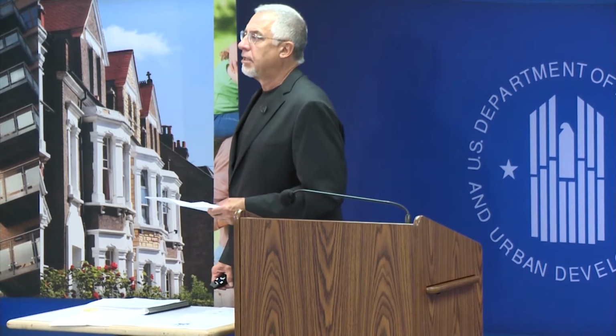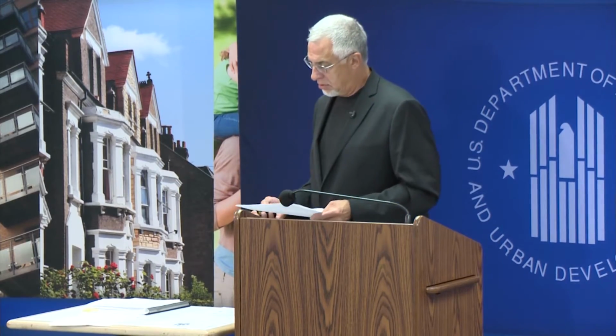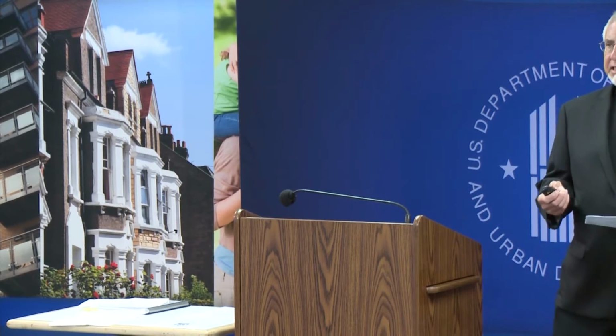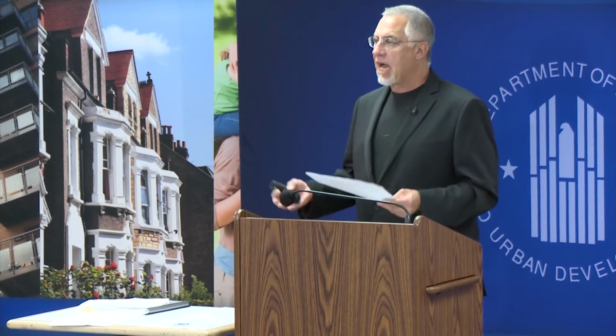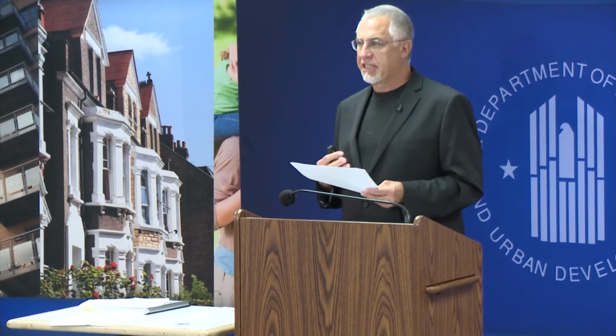Now, let's think further down the line here. Under what circumstances would it not be allowable? If Wilson Consultants drafted the RFP, it would not be allowable to contract with Wilson Consultants to prepare the ICDBG application. Yes, that's right. The rule is that an entity that is involved in developing the procurement documents is precluded from participating in the procurement itself.